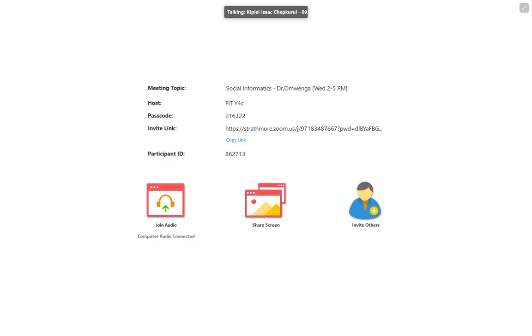A category we chose was project management, and a particular tool was Trello, because Trello is basically a collaboration tool that helps project managers assign tasks to the different people. So basically, we have boards whereby we can add tasks to the board. Then we can keep track of all the tasks and their due dates. We can also allocate people the different tasks, and keep track of who is doing what at a particular time.